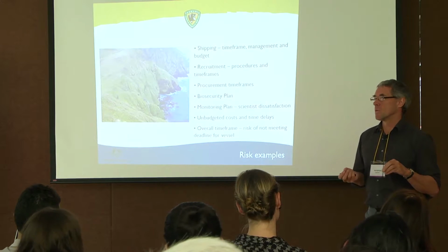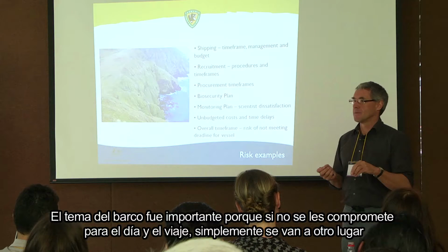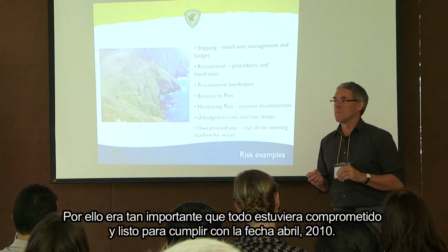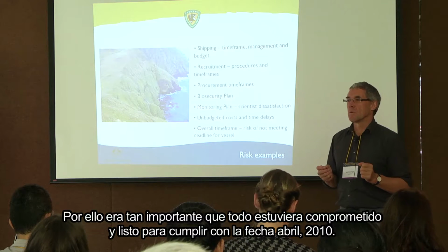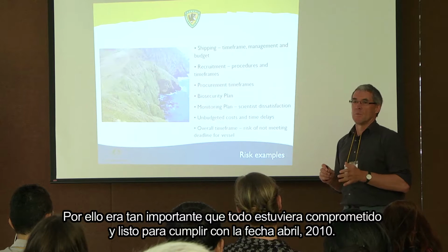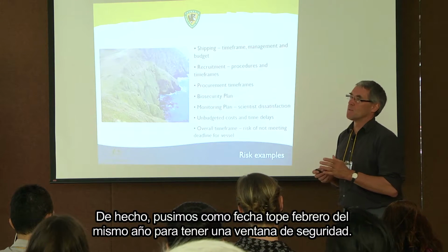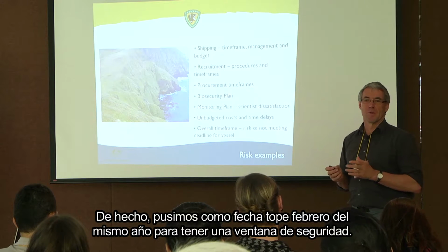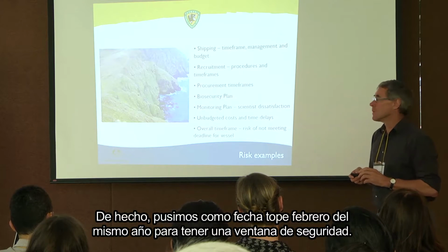And of course, with the ship, they lock in. If you don't want them on a certain date, they want to go and do something else. So really important for us that all of those various facets that we were working on were completed and ready by April 2010. And in fact, we really said February 2010, so that we have a couple of months up our sleeve to allow for any slippage or things that we haven't foreseen.